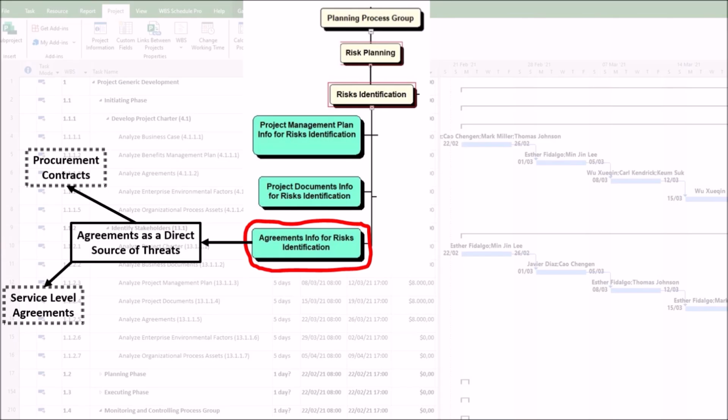Another significant threat is the possibility of a cloud hosting provider suffering a security breach, failing to meet the SLA and exposing project data. Third, letters of intent, memoranda of understanding. Another significant threat is that these documents, while sometimes less formal, create expectations. A party may not follow through on the intent, causing delays in funding or resource allocation.